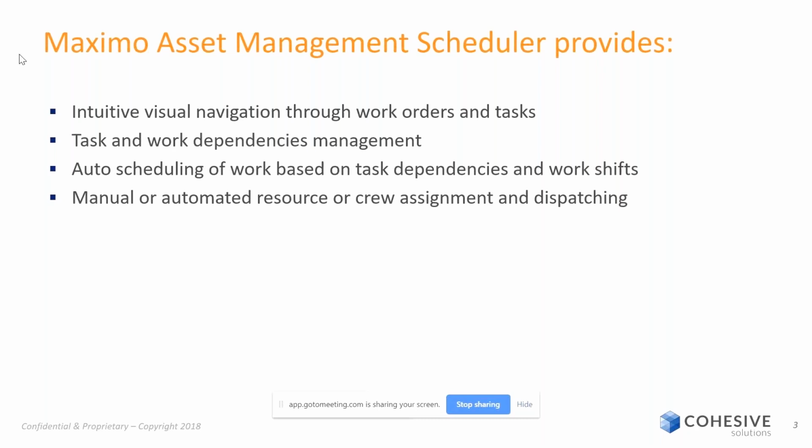If it's something that is consistently applied time after time, you would probably want to set those dependencies up in your job plans so that you do it once and save it, and it's usable from that point forward and doesn't have to be set up again.